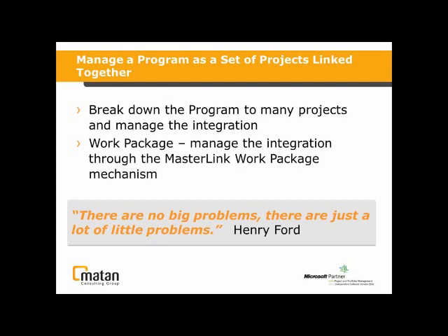So what we suggest is to take this program, break it up into work packages, and have project managers be owners of those work packages. They manage the work packages, they're responsible for everything within the work package, and let the program manager decide what project he needs to dive into. So instead of managing the 40,000 tasks that you have in the program, you can decide on the certain projects and the work packages that are struggling or are on your critical path and that you need to focus on. That's a way you can manage.